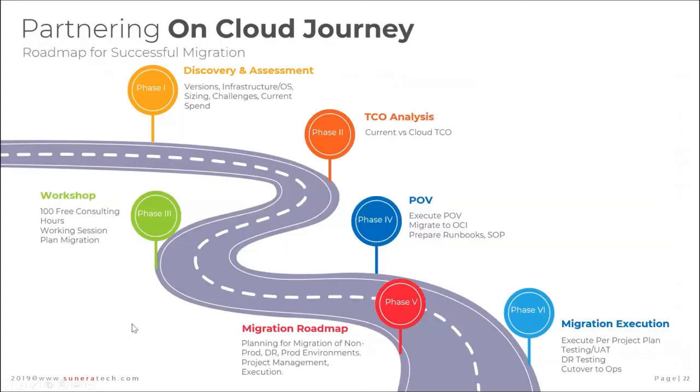So from that point, typically how we partner a cloud journey, discovery and assessment is where we focused on today, right? The current spend, all the considerations, all of that comes into play. Based on that, we put a TCO analysis together, given the current footprint, given the target state: X amount of cost to get there, and Y amount of cost to sustain it there.